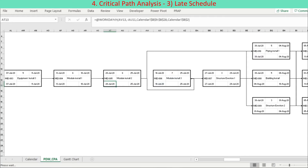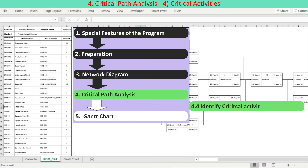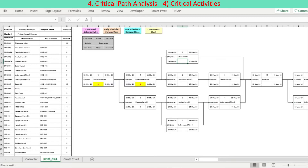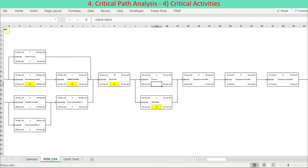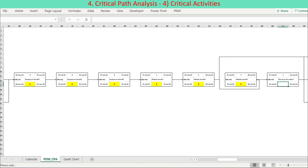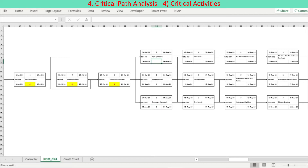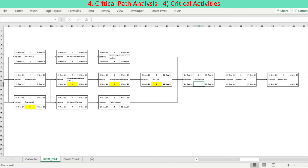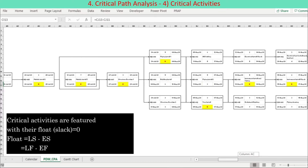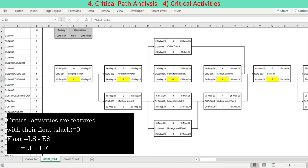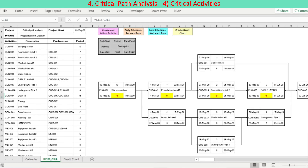Activity start date is calculated by subtracting the period from the activity finish date. The criticality of activities is defined based on each activity's float or slack calculation. The float is computed by comparing the early schedule and the late schedule of the same activity. If the late schedule is later than the early schedule, with float greater than zero, we may delay the activity start or finish date by the float without delaying project completion. But if the late schedule equals the early schedule, with zero float, it is not possible to delay the activity without impacting project completion. Consequently, activities with zero float are defined as critical activities. The float is calculated as LF minus EF, or equivalently LS minus ES. Critical path activities are highlighted with yellow fill and red bold font.